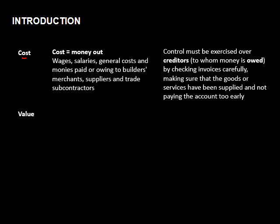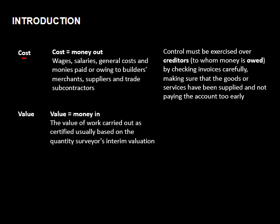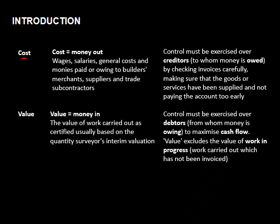Secondly, we look at value. Value is the amount of work that you've done or that you can invoice for — so value is money in. The value of work carried out as certified, usually based on the quantity surveyor's interim valuation. Then cost control must be exercised over your debtors from whom money is owing, to get maximum cash flow.